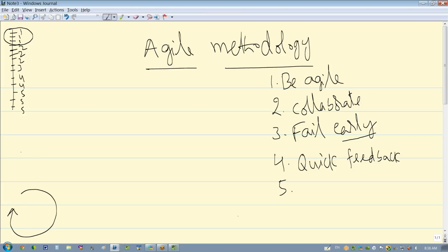Within this 2-week interval, I'll deliver the first item, or second item, or third item. I'll gather the detailed requirements for those top 3 items, and then I'll do the design, the development, the testing, and the deployment. We're not talking about 2 months now, but 2 weeks. Earlier, I took all those 200 items, but now we're only taking 1 or 2 items.